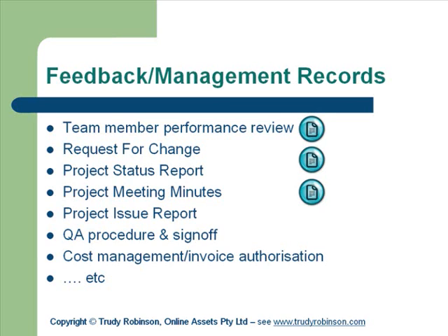But you should still have access to people. If I was going to run a project for 2 years and be in charge of 100 people, I'd make sure I had an HR resource allocated as one of the stakeholders that I could pay for as one of the team members, because you are going to have people needing leave, people who don't perform, people who need to be replaced, that sort of thing happening throughout the whole project. So you're going to need to have an HR expert on your team.